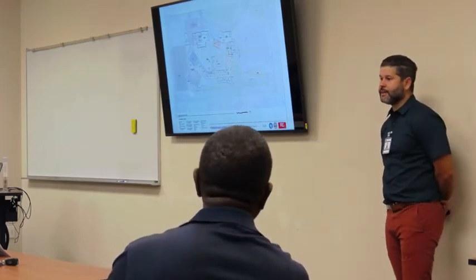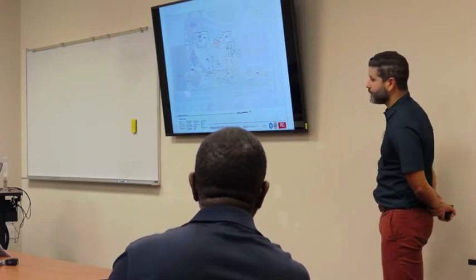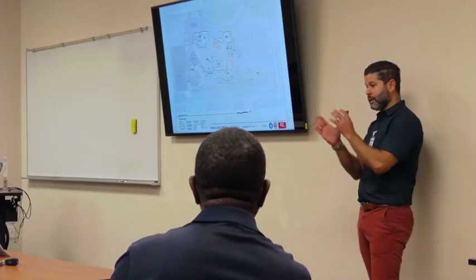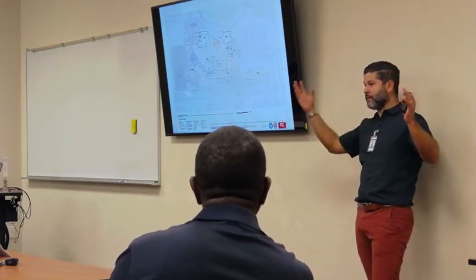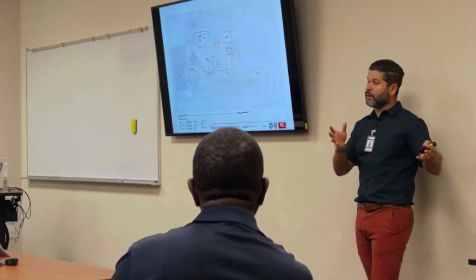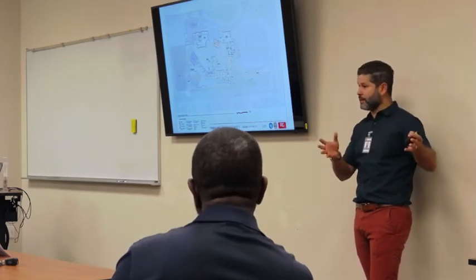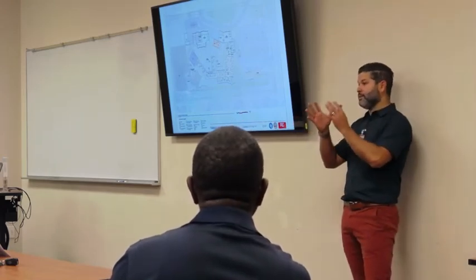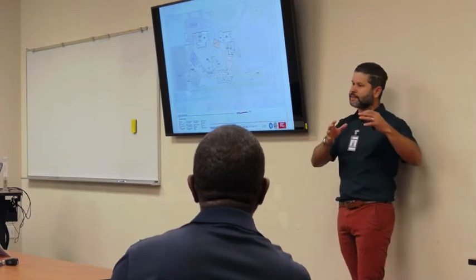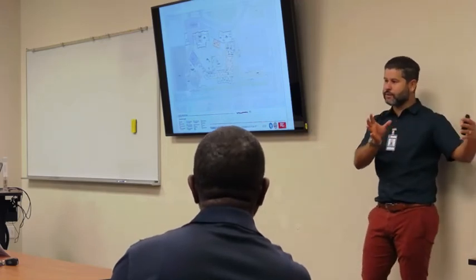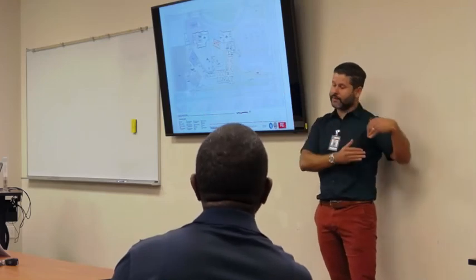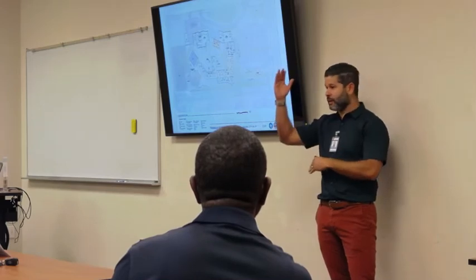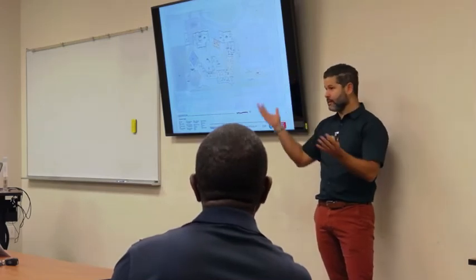And it's consensus, I cannot stress enough how much consensus is built into this project. So I'll put a very simple example, the temporary site, right? The temporary site is a large field that is across the street from James Stevens, which is currently being used for a men and women soccer league on the weekend. So we made every effort for the temp site to not disturb, I mean, it will disturb, but at least give them the opportunity to continue using those fields. And more importantly, once the trailers and the portables are taken out, they're gonna be left with additional parking that is lit, because currently there's no light in there.